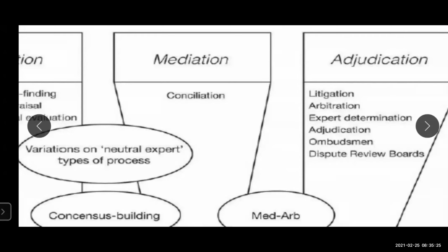Adjudication, closer to arbitration too, but less formal than arbitration. Expert determination, those that know will be the ones to tell you that this is right, this is wrong. They are experts. So once they determine the case, you know that, of course, that is the way you should see it. More like a judge. You know, the judge is an expert in deciding a case. So, of course, a quantity surveyor is an expert in deciding cases on the cost of construction projects.